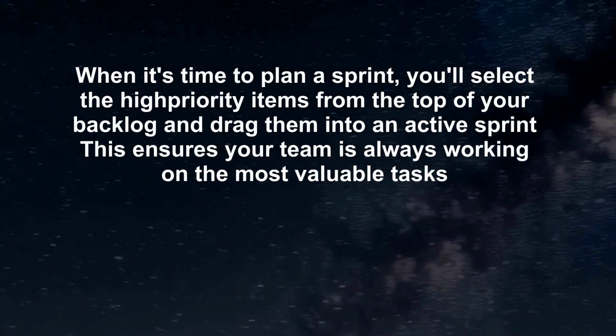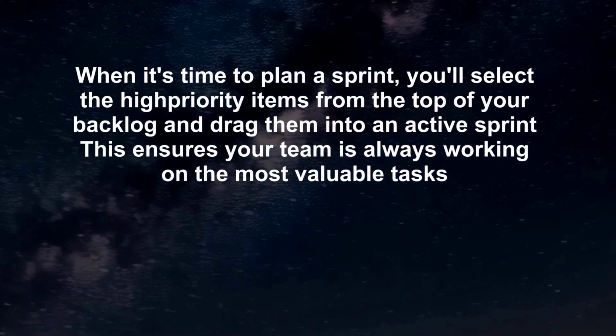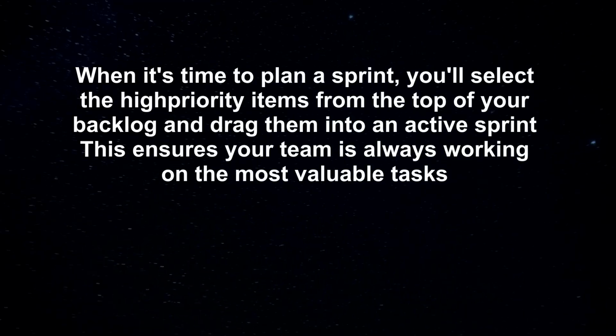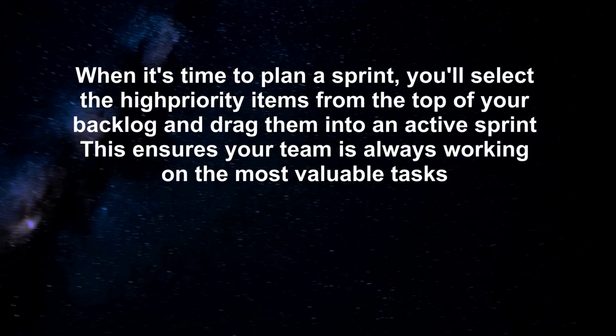When it's time to plan a sprint, you'll select the high-priority items from the top of your backlog and drag them into an active sprint. This ensures your team is always working on the most valuable tasks.